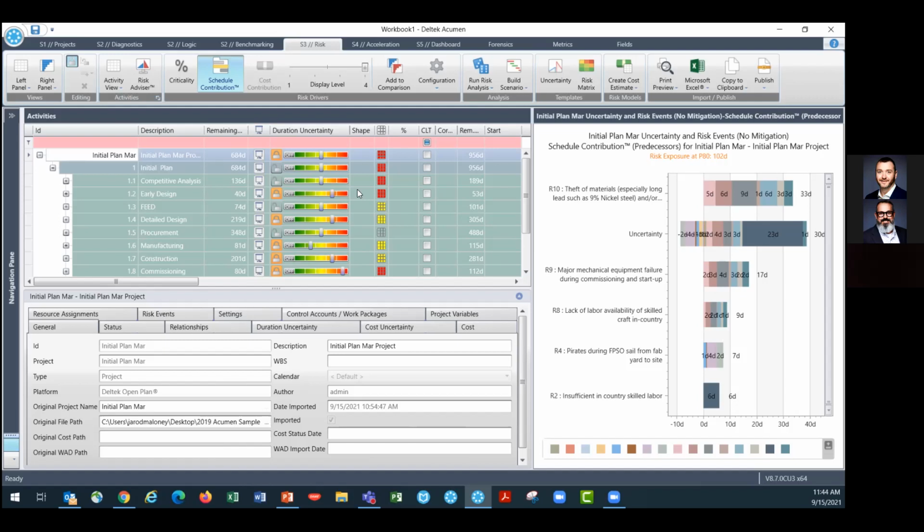Now, we may use data such as that duration performance that I was looking at earlier, or some of the existing performance for our ongoing plans, or maybe it's just historicals. I've moved some of these into a red here, as you can see, basically saying we think those are more at risk of coming in late. And I've put a couple as potential opportunities.